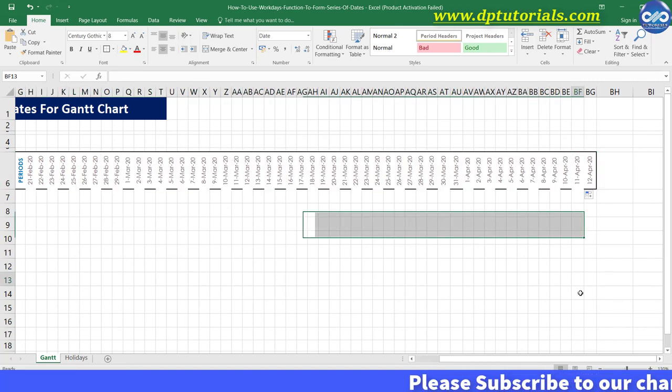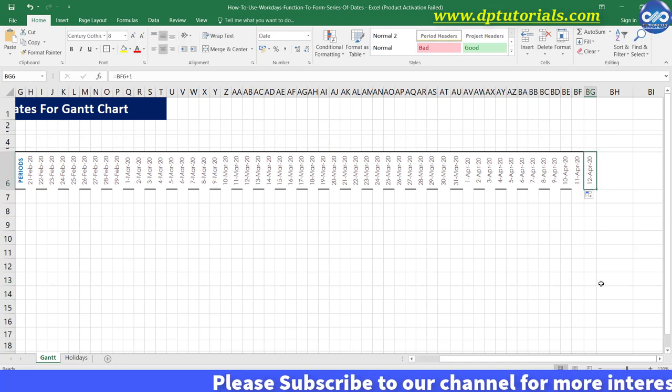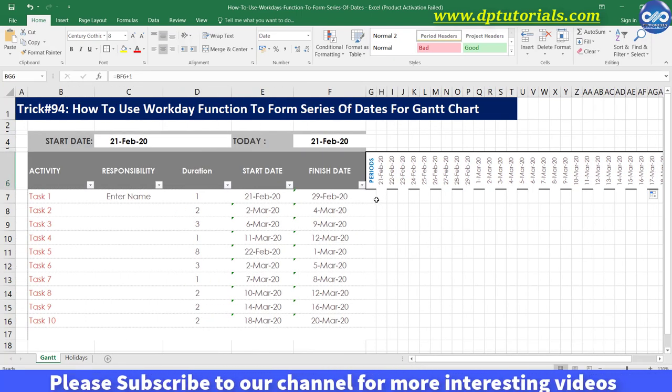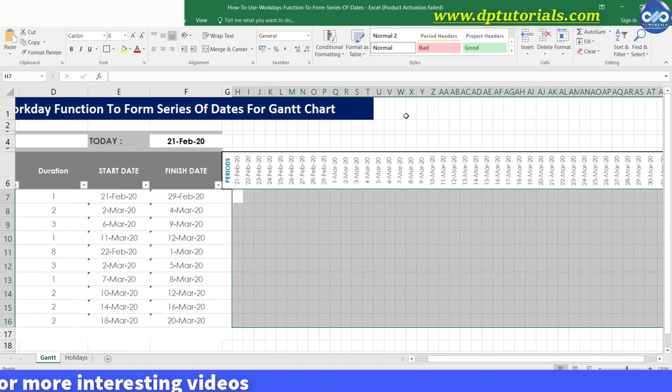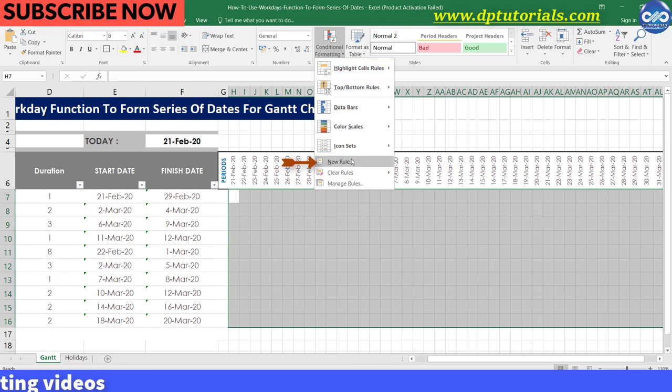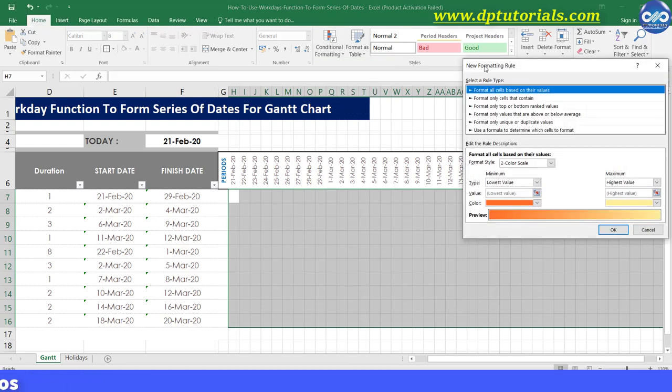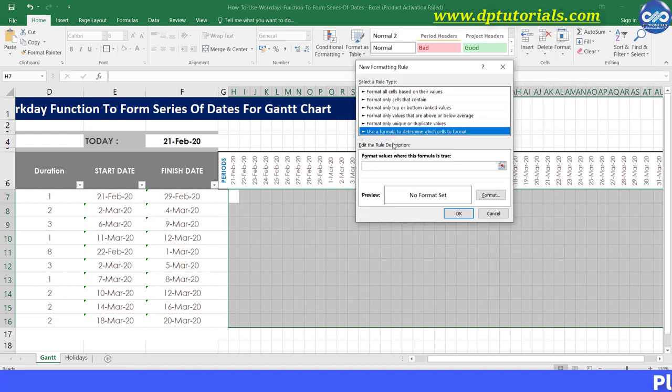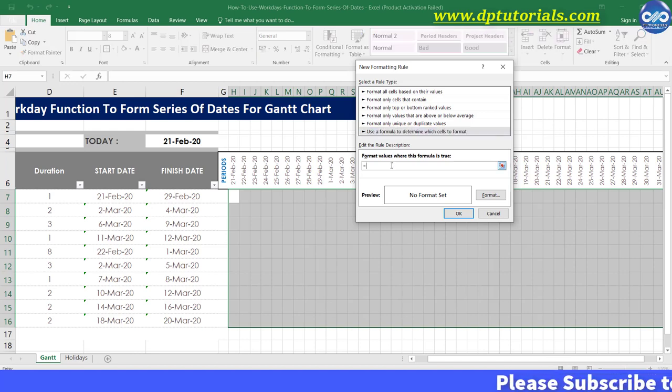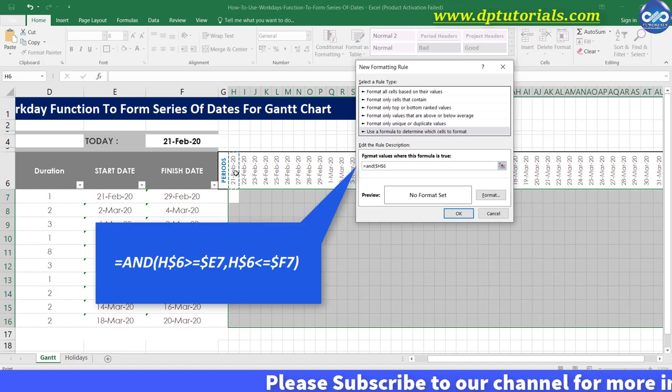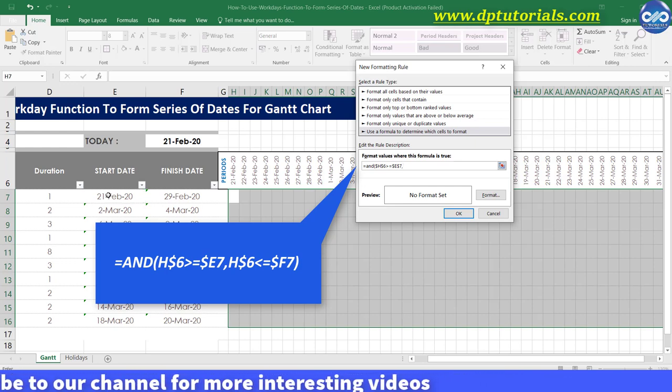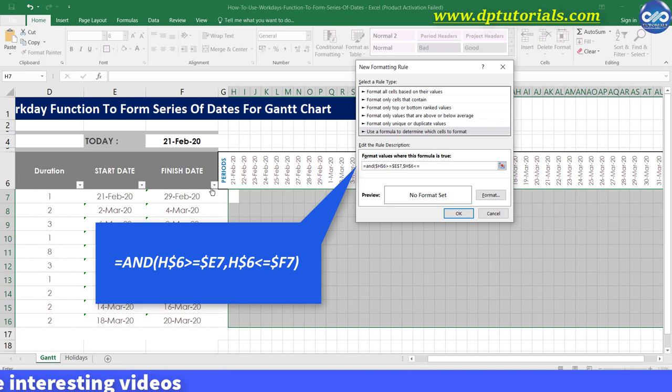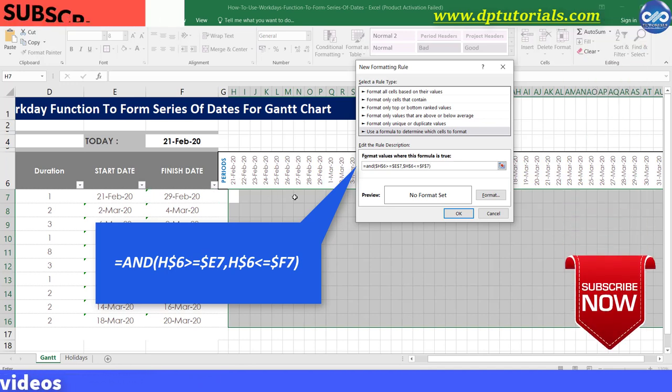Now let us apply conditional formatting here to show bars. I select all the relevant cells and click on conditional formatting, click on new rule and then select the last option, use a formula to determine which cells to format. And then type the formula in this space as equals to and open the bracket. H6 greater than or equal to E7 comma H6 less than or equal to F7 close the bracket.